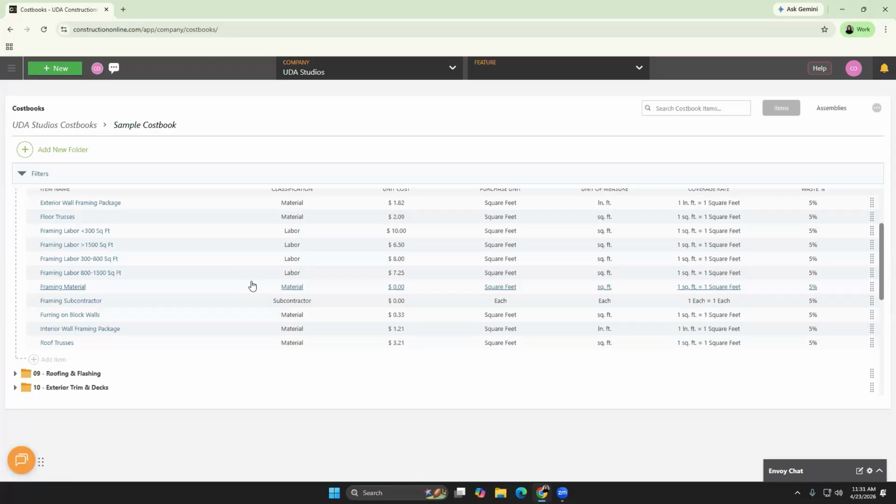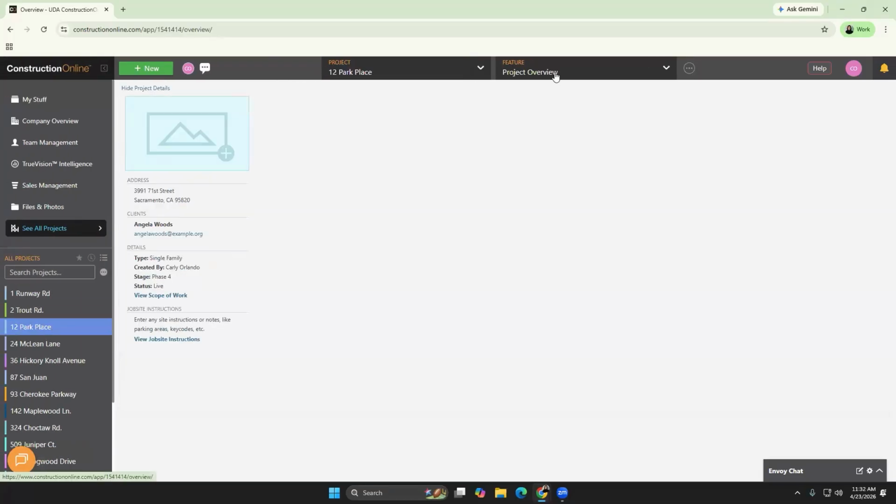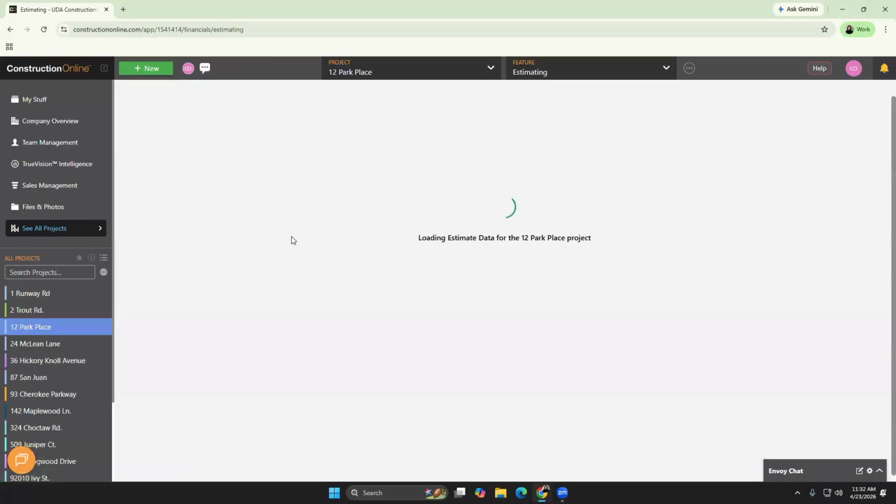It's actually going to create a subcategory in your estimate. So when you're thinking about something like a standard bathroom rough-in or specific framing configuration you're building repeatedly, building out those assemblies can make it really effective because you're able to go in and add the material item, the associated labor, waste percentages, and even coverage rates if applicable. You build it once in the cost book, and from then on, you can add it to any estimate in seconds.